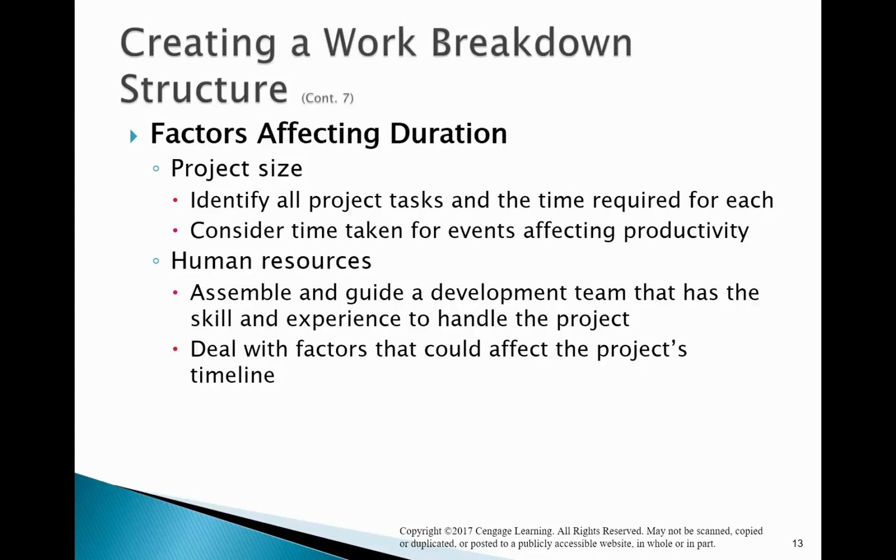Duration depends on different things. Do you put a lot of fudge factor in there? Yeah, no, not really. If you do, then you'll end up doing that forever. If a feasibility study says that it'll take a week, you may want to add a day or 2 days to this one step, but I wouldn't add a whole lot more than 10%. I would keep it 10% or less.